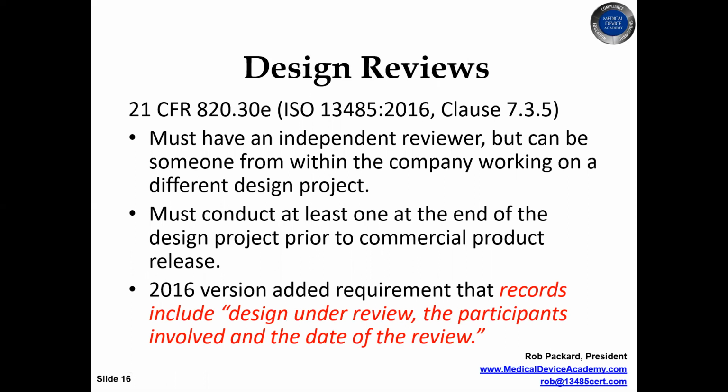At every phase gate, you're going to have a design review. You can do more than that. You could, in theory, do less. You could do legally just one design review at the very end of the process to release your product. That is allowed, not recommended.